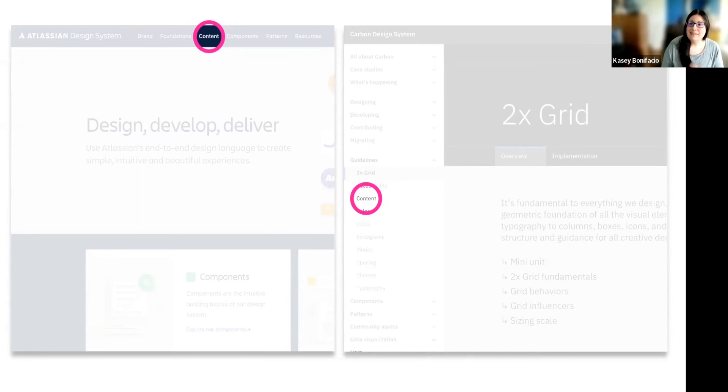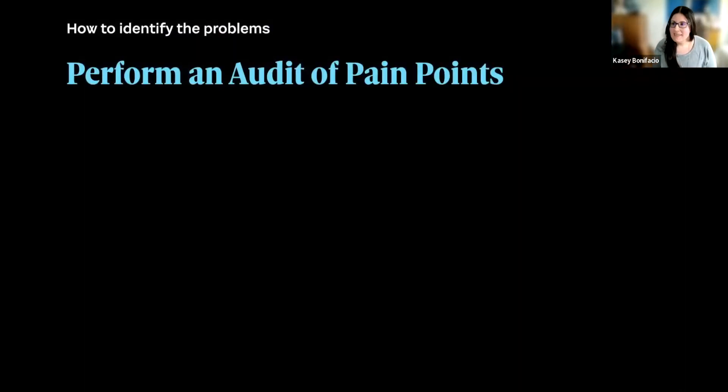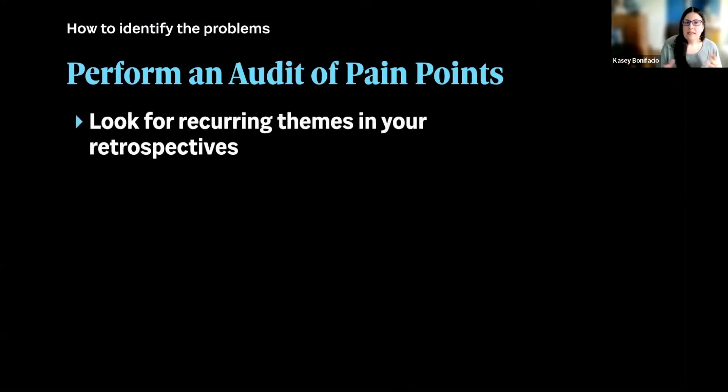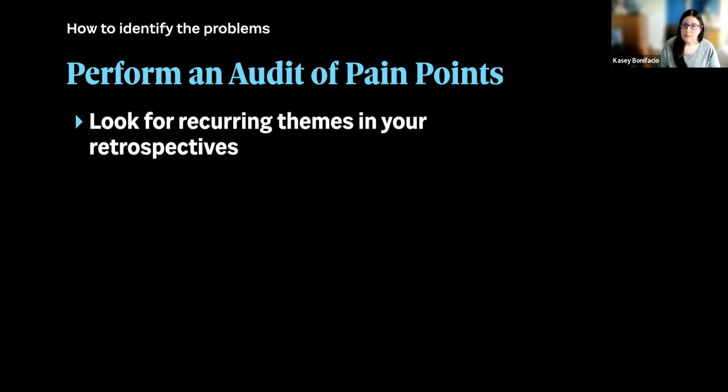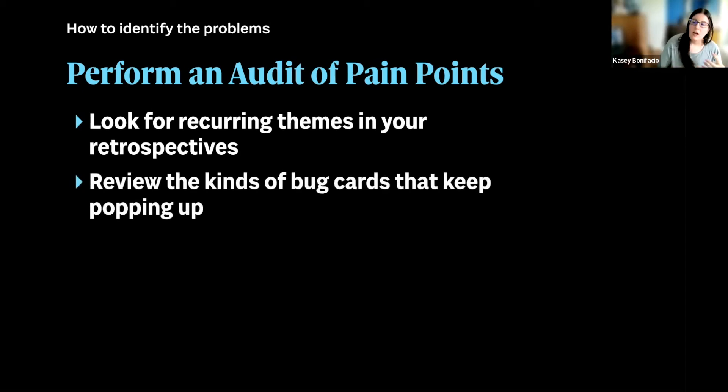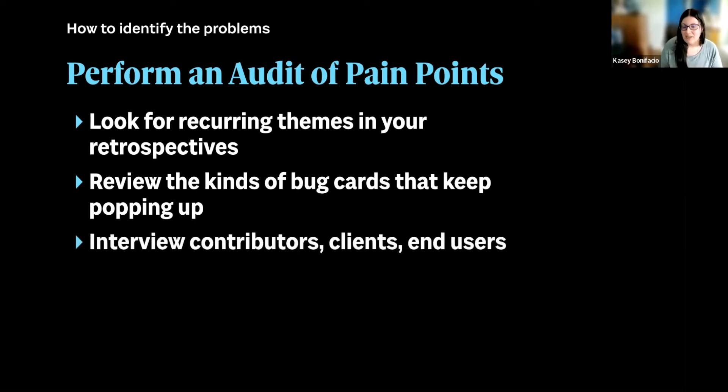So it's easy to say that we need to solve our problems, though, but how do we actually do that? One of the ways that we can do this is by performing an audit of pain points. This could look like digging into notes from previous project retrospectives. You know, what are the types of problems that your teams are running into? You could review the kinds of bug cards that are popping up in development. Are they just one-offs? Are they recurring? And then you can ask people. Reach out and ask people what kinds of problems they encounter in their work and what they would like help with.